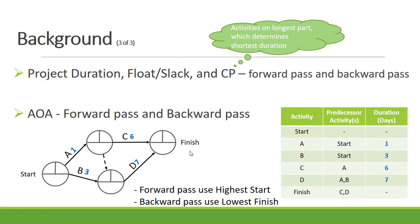We use the forward pass and backward pass to calculate our project duration, our total float, and the critical path of the project. The critical path is the activities on the longest path, which determines the shortest duration of the project. Let's have a look at a small example to explain the forward pass and backward pass.